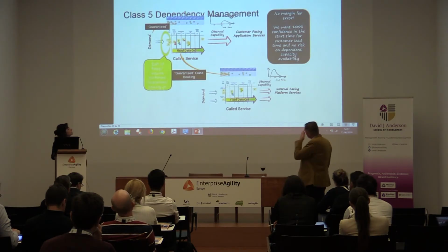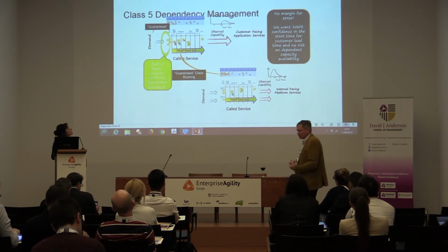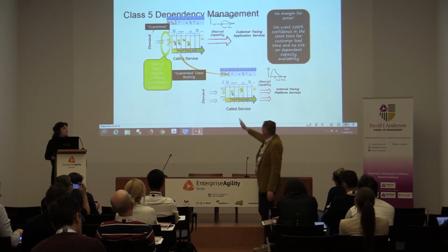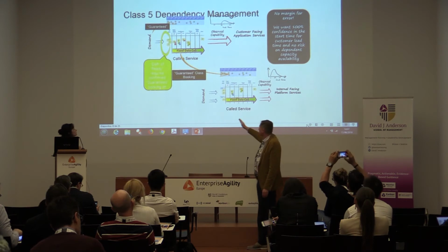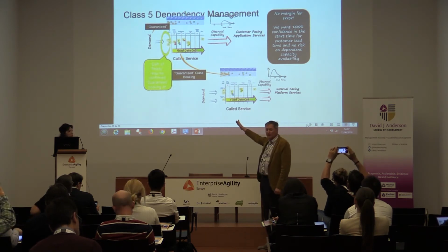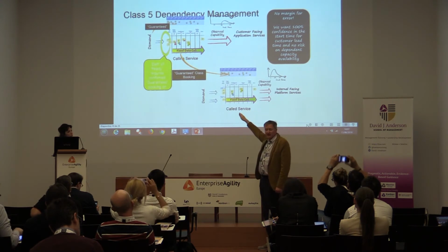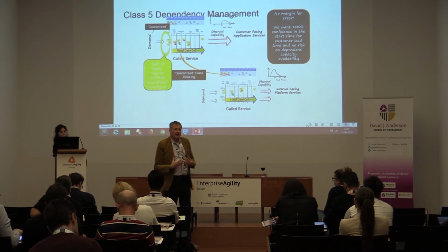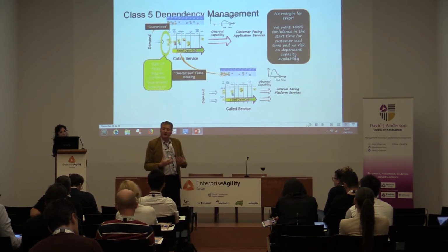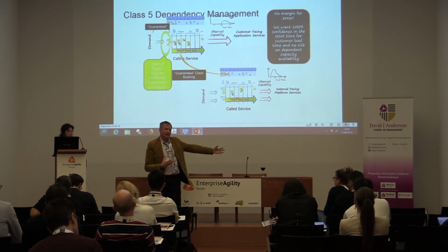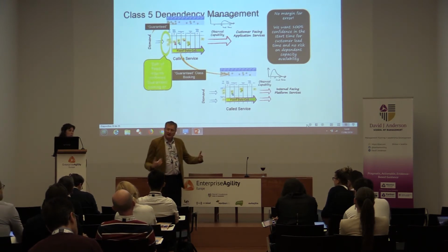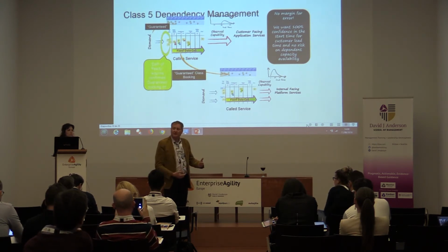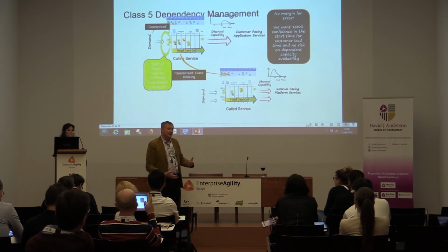Next. So there's the fifth one, where everything is so critical, there's really no room for any maneuver whatsoever. That's a high-risk ticket that's coming in from the customer. We need to guarantee the customer when we're going to start it. It has a fixed date class of service, so the customer comes to us with their Christmas advertising campaign and they want to launch that in the middle of November in order to get the maximum value from it. And the contract that they've given us says you must deliver the campaign ready for launch on, say, November the 15th. And we don't get paid if we don't hit that date.